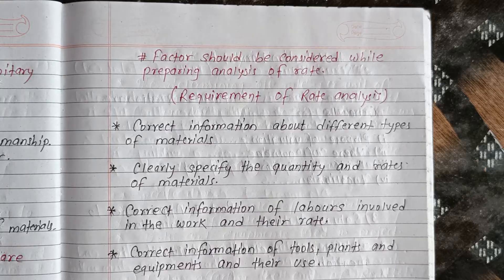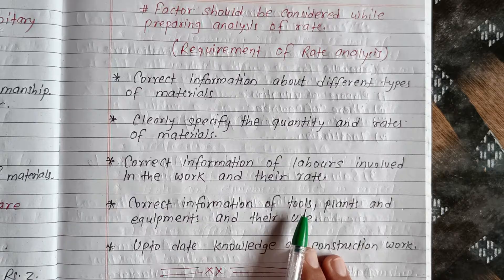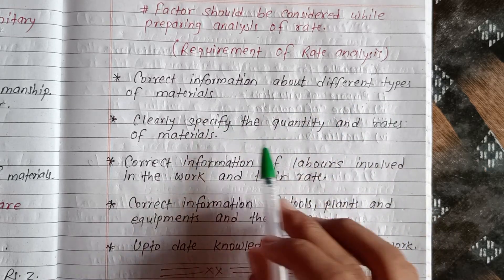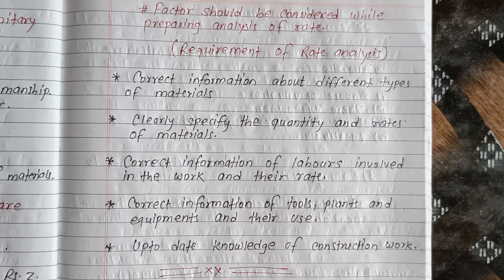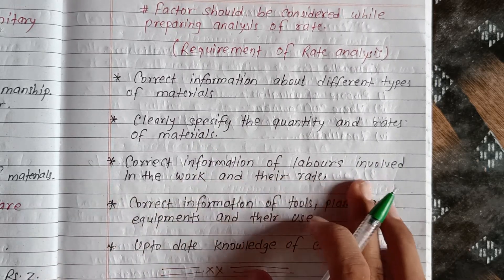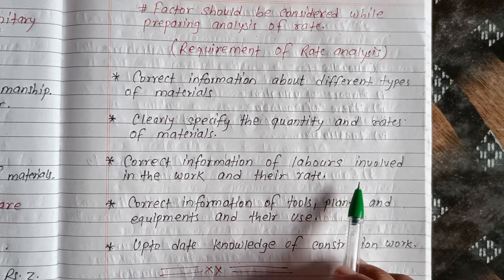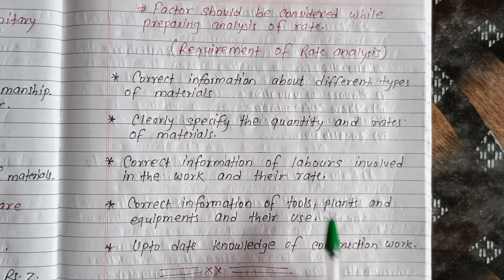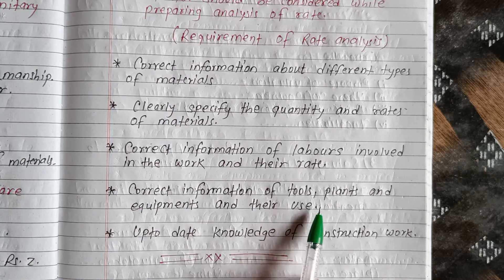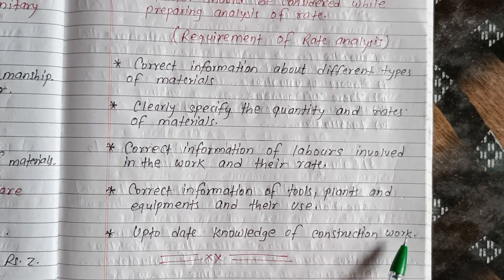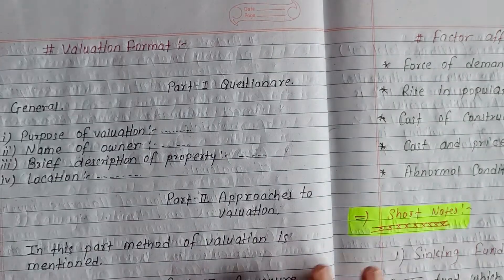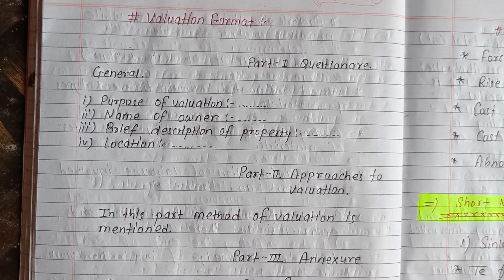An important question is: what factors should be considered while preparing an analysis of rate? Rate analysis requires correct information about different types of materials being used, the quality, quantity, and rate of materials clearly specified, correct information about the labour involved in the work and their rate, their skills and quality, and correct information about tools, plants and equipment, plus up-to-date knowledge of construction methods.